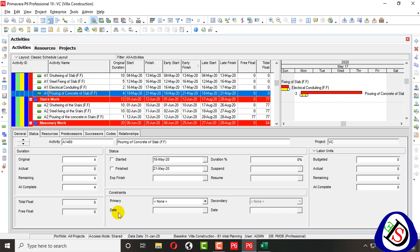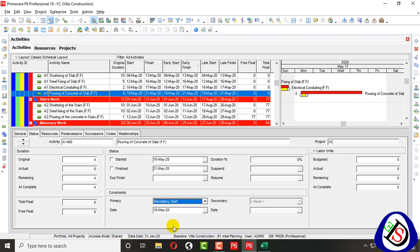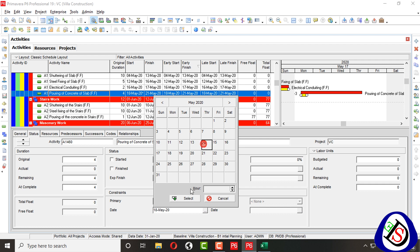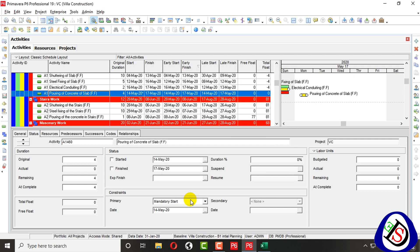From here I can assign constraints to start and finish. First, Mandatory Start: the Mandatory Start is applied on both Early Start and Late Start — it will freeze both. If I change the date, for example from 18 May to 14 May, and press F9 to schedule the project on 31st January, you can see it freezes all the start dates.